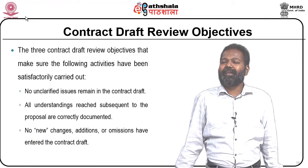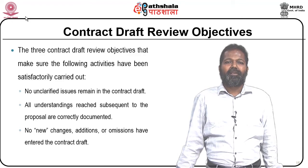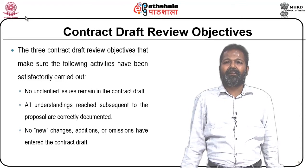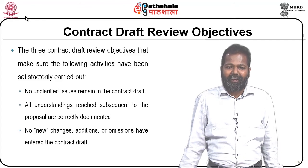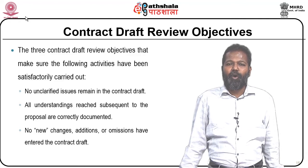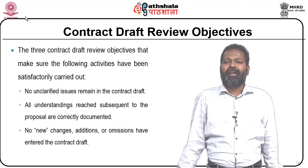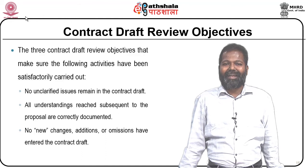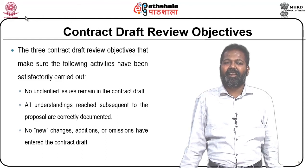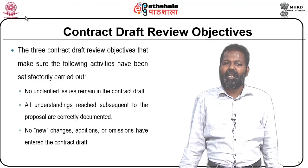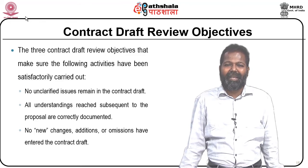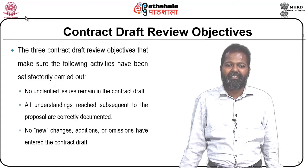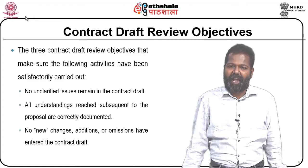The contract draft review objectives ensure the following activities have been satisfactorily carried out: no unclarified issues remain in the contract draft; all understandings reached subsequent to the proposal are correctly documented; and no new changes, additions or omissions have entered the contract draft.